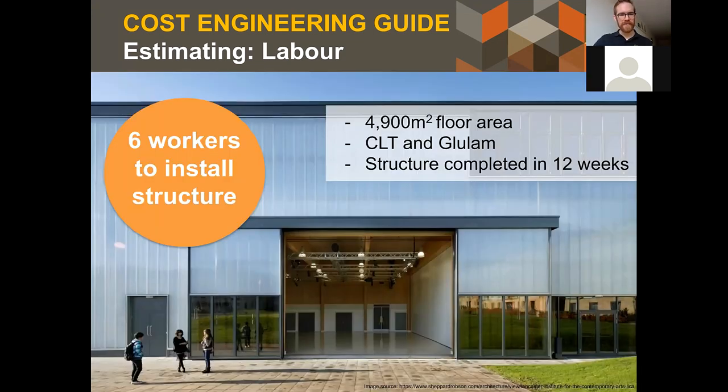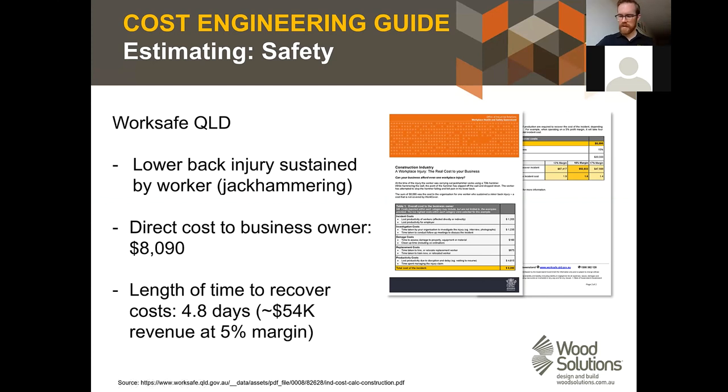Another good example. This is a beautiful, beautiful project in the UK. Quite a large floor area, as you can see. Big spans, big high open areas. You'd think that this would require more people and more plant and equipment. But it took 6 workers 10 to 12 weeks to install. So it's a really impressive outcome.